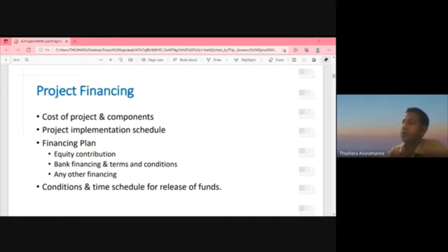Or maybe you might hire an independent person like a valuer or an engineer within your bank and do an estimate, a status update, validation on the existing construction level. And then you compare with the original budget, whether we are in line with the budget in terms of cost, in terms of time, if there is any lag, why it happens, and how we are going to rectify it. So all those things need to be carried out.